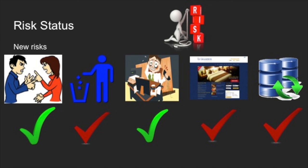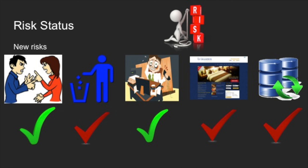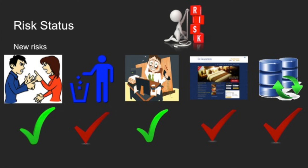As for the risks we have not yet checked, there's the utilized risk, or failure to utilize the project results in the end, meaning that the customer cannot benefit from the project. The prototype risk, which the client might not be satisfied with the UI design presented in our prototype and ask us to reimplement it. And then the last risk, which we have not checked, is the architectural design or the database risk. We started to use Acquia Development Desktop Solutions to establish the database. However, we are still working to combine the database Drupal provided with our own established one together.